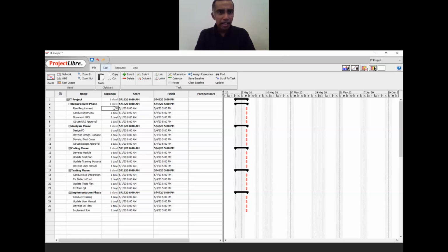You can enter 5D. D stands for days, right? Whenever you want to enter days, you type D. Whenever you want to enter weeks, you enter W. Whenever you want to enter hours, for example 5 hours, you just put H. Whenever you want to enter minutes, you type M. Whenever you want to enter months, you put MO or MON. These are the various combinations that you have.